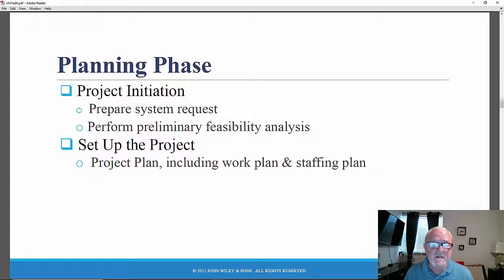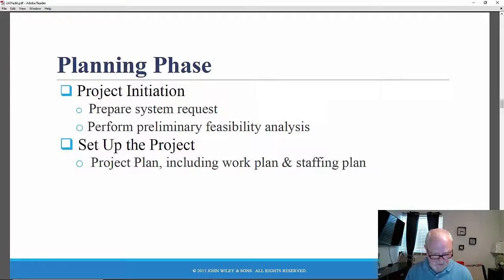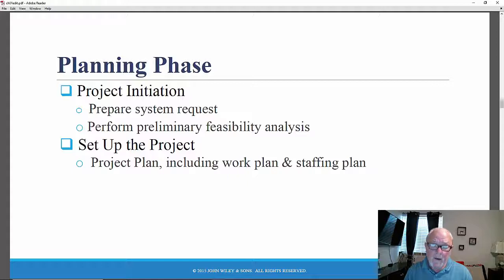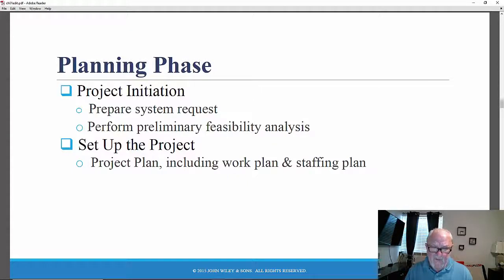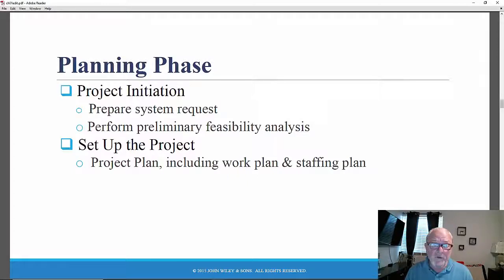Organizational feasibility: if we build it, will people actually use it? Will it be successful in its use? The system request is the key deliverable from the planning phase. Once a system request is approved, the project manager will develop a work plan, which is also a key deliverable.